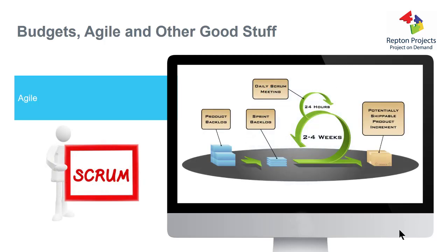And this is the cycle of events that happens within an Agile project. We have what's called a product backlog. Again, if you think back to the product breakdown structure, we've got those products that we want to build. In the earlier slide, we talked about those products being part of the onion. So we look at our product backlog and say, which products do we think we can build as part of this next cycle of the build? There we take those into our sprint backlog, and we've decided which products are in that sprint.